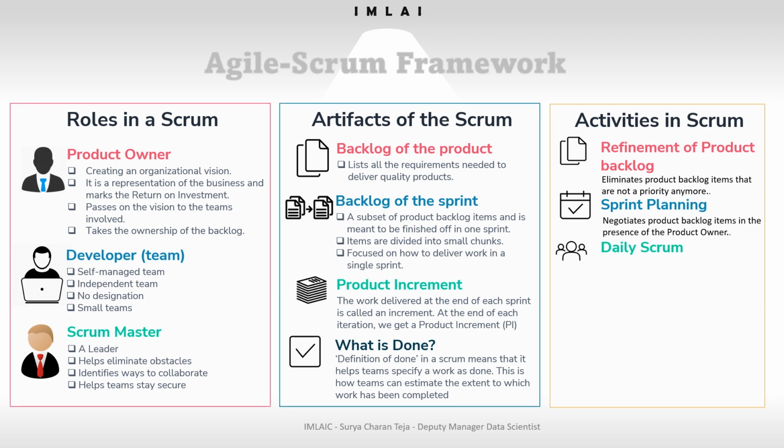And after that, what we have is the daily meeting of a scrum, or daily scrum. In the shortest and sweetest way, we call it the daily scrum meeting. The daily scrum is a meeting held every morning for a maximum of 15 minutes. This is also known as the daily stand-up meeting. It's very famous by the name stand-up. I'm not talking about stand-up comedy. I'm talking about the daily stand-up meeting. This is a very important meeting.